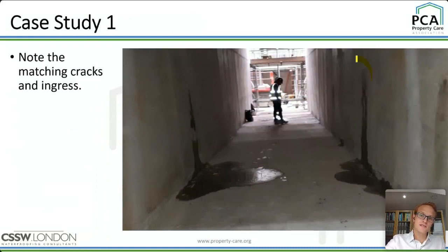So we've got these leaks here. And you might notice that they are sort of parallel, they're mirrored. And the main contractor said to the concrete contractor, we're not paying you because it leaks, so you must have got your waterproof concrete wrong. The concrete contractor had to go to adjudication to try and get the main contractor to pay them.